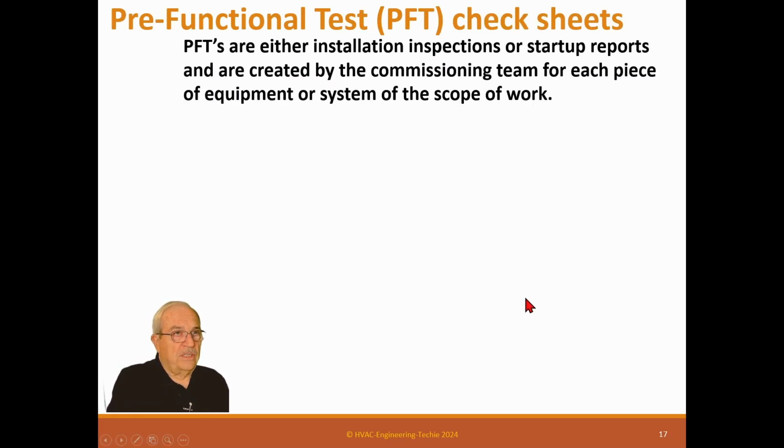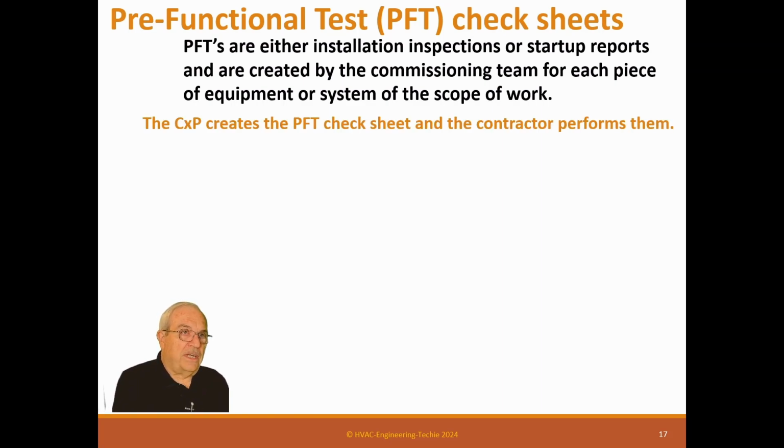Pre-functional check sheets. PFTs are either installations, and I apologize for this, but this was caused by ASHRAE, which has actually led this process of the numbers and all that stuff. The PFTs can either be installation inspections or they can be startup inspections. So there's actually two kinds of pre-functional tests. So the CXP creates a PFT check sheet and the contractor performs them.